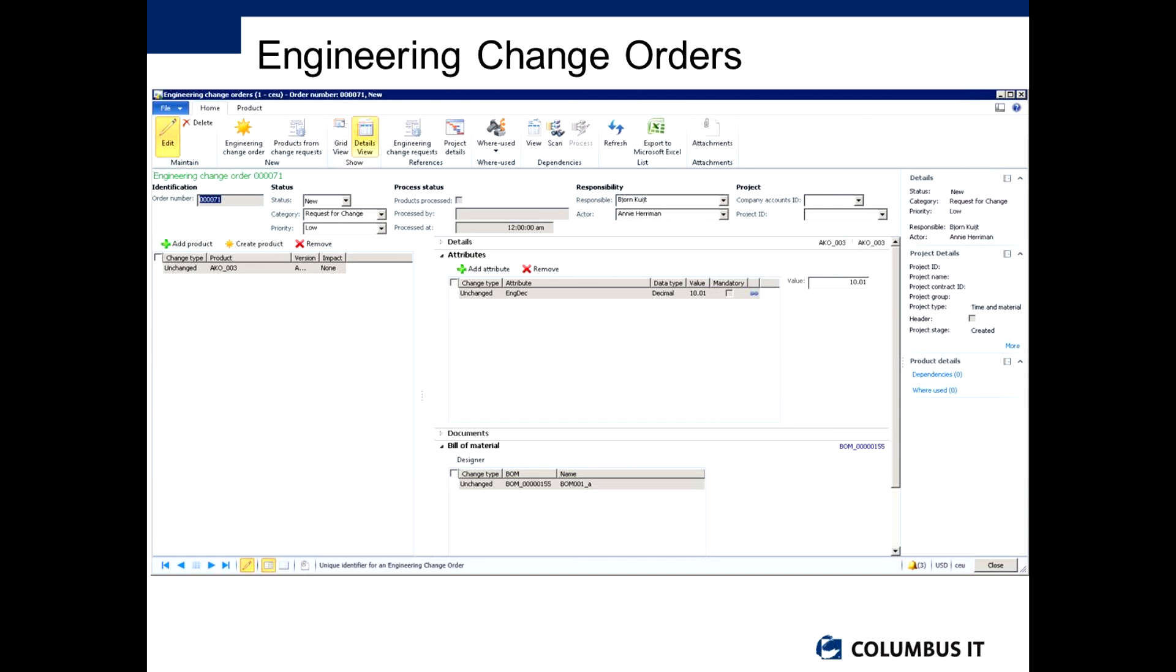We'll actually do a search for those and more than that it will also allow us to process those dependencies. So once it's come back with a list of all of the sales orders for example for version A, I can then say update those to version B. If it finds any production orders I can say put that production order on hold and don't allow it to go any further, or I can say if it's not been started yet change it from version A to version B. It's giving me a lot of power in actually looking at the impact of the engineering change and then making it a lot easier to actually action those changes that I need to make through that part of the system.